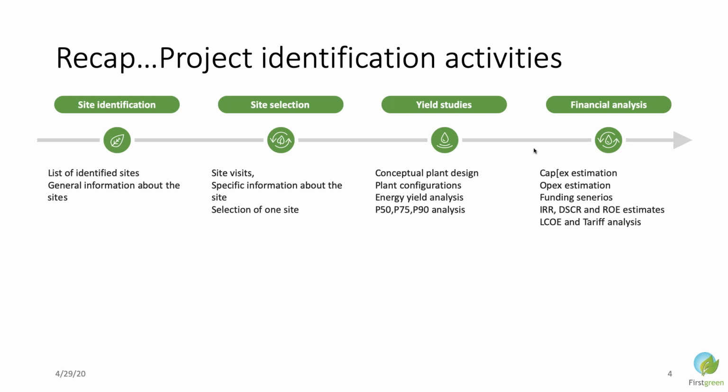Based on that, he will be finding out which locations he can install, which are the states of his best choice, whether there will be good solar radiation, whether the site will be appropriate or not. And he has a couple of options to shortlist. He conducts site visits to the locations, meets people, collects information about the project implementation process, the local regulations, physical assessment of the site, and all that.